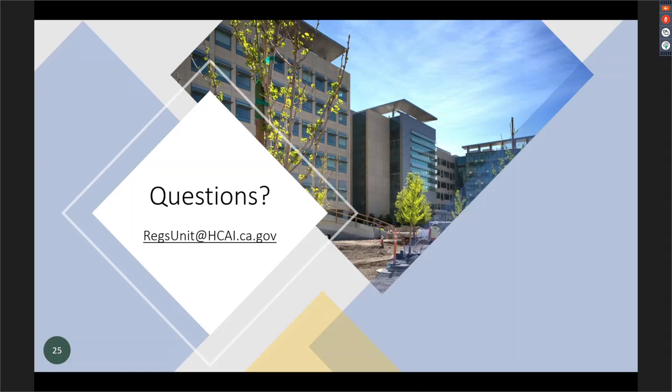Richard, the next question has to do with IORs. The question reads, is there a change in project IOR's role on the project with the revised CAN? Do they review RFIs to concur with DPOR's assessment of NMA, or do they review only the change log? The only mention of an IOR in the CAN is specifically to help maintain the change log. I'm not going to get into who's reviewing RFIs. As far as I'm concerned, it's not the IOR's decision. It's the design professional's decision to make. So I would say the IOR should not get involved in that.